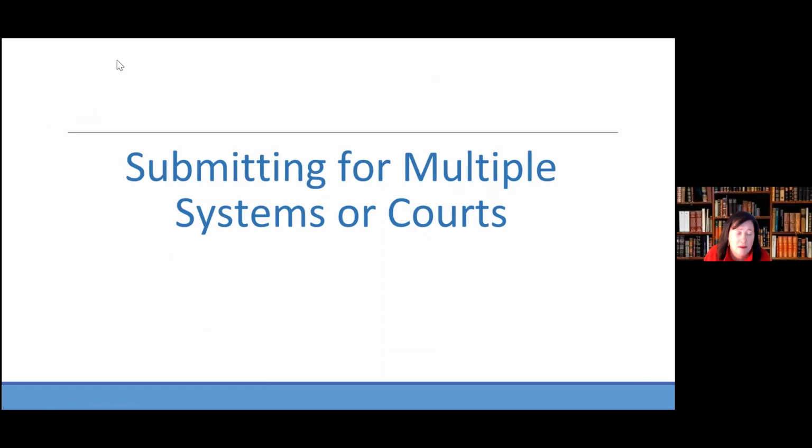Thanks, Susan. Yes, Peter, I see your message. You can do a line item transfer at any amount, but the necessity and the requirement is clearly if it exceeds 5% in the category. If you try to enter your FSR, it will not accept it. It'll say that there's an error message. So if you're nearing some budget category ceilings, I would take a look sooner rather than later.